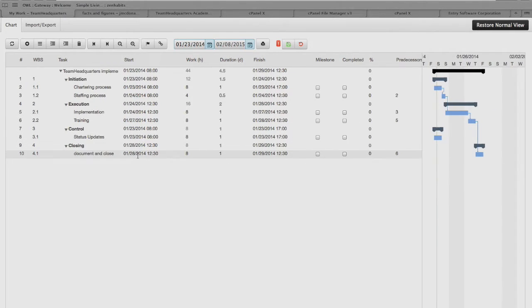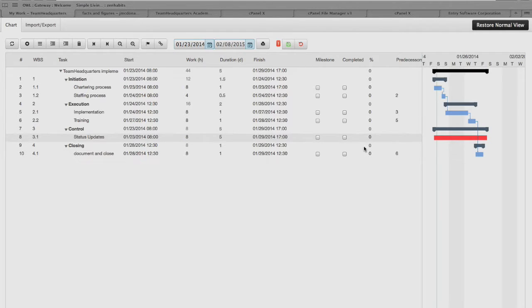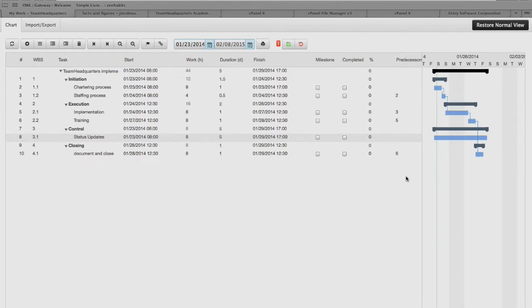We can also say our status updates may only be eight hours long, but they span the full duration of the project, so we'll set that to five days to execute. Now when we turn on our critical path, we can see which items are critical path — because this is the longest chain without any breaks and has no slack time, it calculates it as our critical path item. However, this isn't really accurate in this case, so we'll just turn that off.